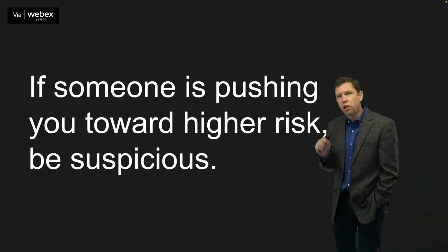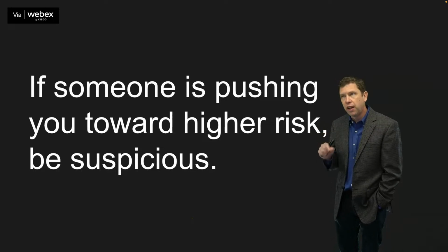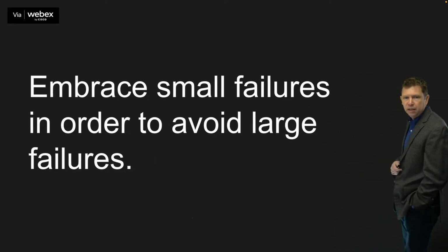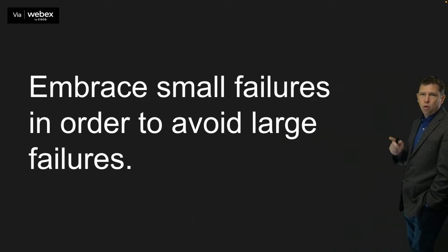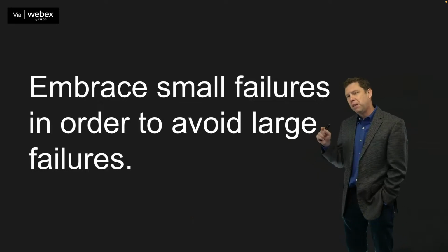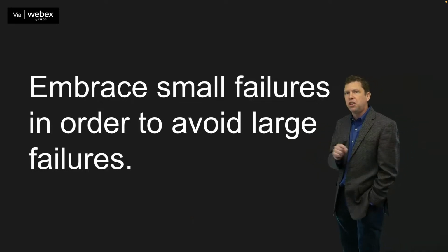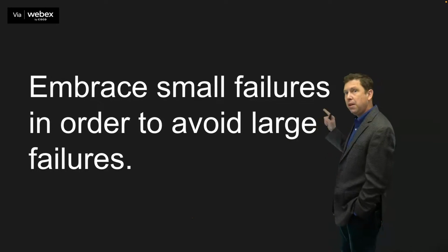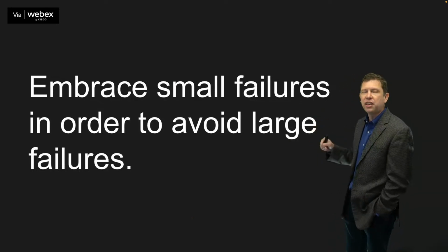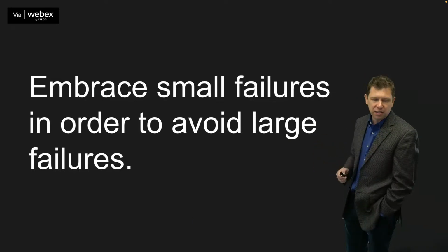And pushing toward a large team before you've developed the ability to deliver as a small team is pushing you toward higher risk. Embrace small failures in order to avoid large failures. So the fact you've got a small team that may not be hitting the mark of what they need to do efficiently, embrace that and figure out how to change it when it's small and you actually can change it, instead of trying to scale up the thing that is not working.